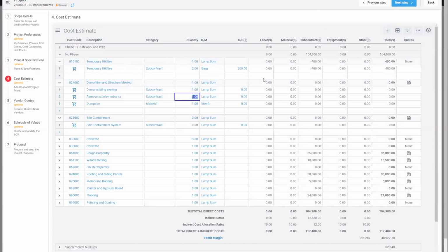Now, you don't have to use a mouse. You actually can jump around the estimate directly using keyboard, and any numbers that are changed on here, for example, if I just change out this and move over, auto calculates and auto saves. So the estimate is nice and quick and easy to use. Once you have an estimate built out, though, you can start building bid packages. So with that, you would go up here and you would start to add a bid package.